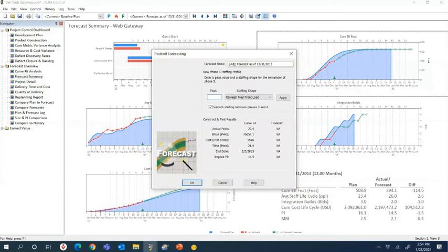What if we add people? How's that going to impact everything? Within seconds, I can see the impact of that by hitting apply, and you can see the new estimate. So my initial estimate, 27 people, $5.5 million cost, and 21 months. You can see if I add people, I'm going to save a little bit of time, but I'm going to throw my cost way up. I'm going to go from $5.5 million to $6.8 million. I'm only going to save just 3 weeks or so. That's a red flag. I don't know if that's a good decision.